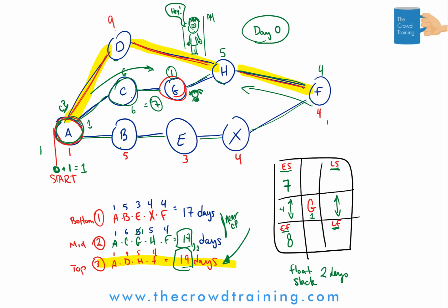Okay, so as I mentioned, we have 2 days of relaxation in time sense between that and the critical path. So that means that 7 plus 2 is 9. So as long as we start it by day 9, then we should achieve the path and all the work in time for our expectations of having it all complete on the 19th day.